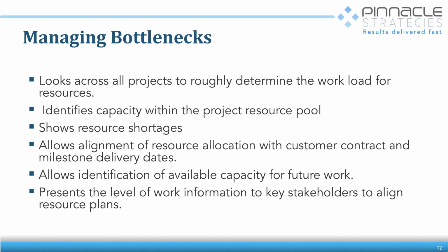And so once we know what the bottlenecks are, we can look across all the projects and we can roughly determine the workload. And once we know that, we can align our resource allocation process. We can identify, do we need to hire people or move people around? We can spend money or not spend money. So this is a big step forward in being able to manage our projects and really start to manage in